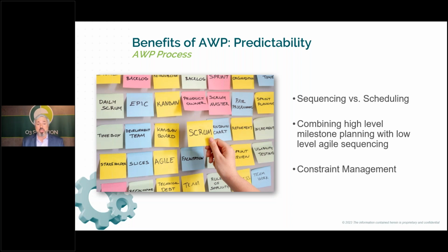So typically what we recommend to clients is that they do up to their level 3 from a scheduling perspective, right? Or they do level 1, level 2 kind of milestone planning, and then they move into a sequencing process where now I want to sequence my CWPs and my IWPs, and then even my tasks down below that are managed using task management within the tool, as opposed to trying to do everything as rigid activities inside of a very fixed and rigid schedule.